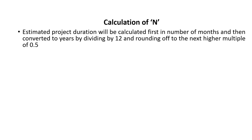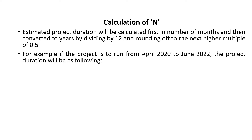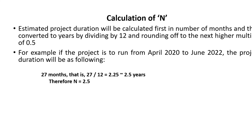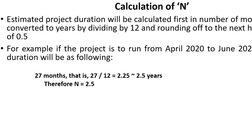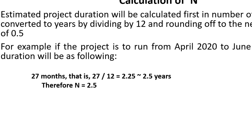This is the calculation of N. The estimated project duration will be calculated first in number of months and then converted to years by dividing by 12. For example, if the project is to run from April 2020 to June 2022, the project duration will be 27 months, that is 27 divided by 12, which equals 2.25. Round off this value to the next higher multiple of 0.5. Therefore, N equals 2.5.